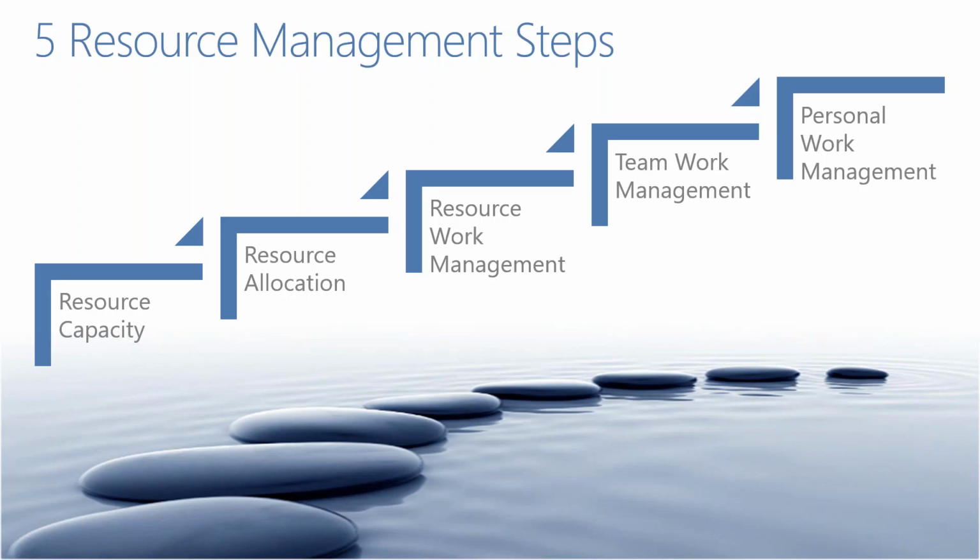Then resource work management is really about taking that to the next level of specific people being assigned to work, but then looking at overall work management, meaning we're factoring in things like the operational work and the competing priorities that they may have outside of the project initiatives. And the idea is we're looking at a total work focus in that stage.